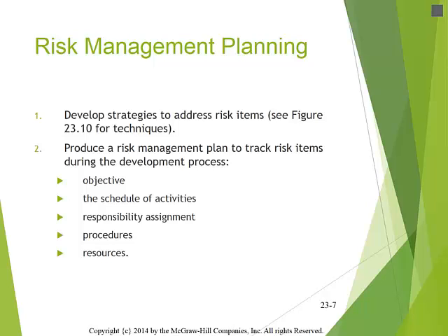After analyzing the risks and prioritizing them by risk exposure, creating a risk management plan takes place. This is a plan to manage the top priority risks during the development process. First, strategies must be developed to address the risk items. Some of these strategies could be the risk management techniques that were discussed for the top 10 risks. Other techniques are expert opinions, project management experiences, and brainstorming.